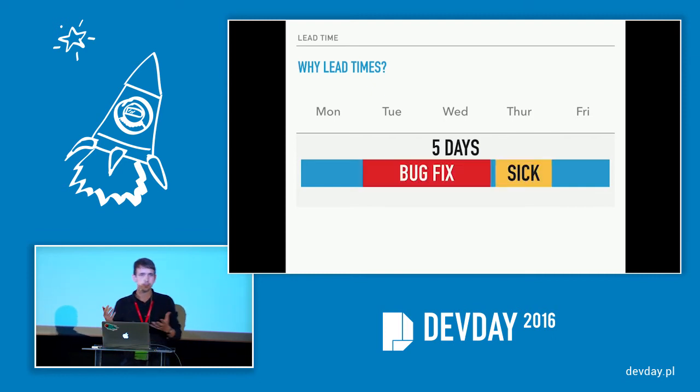It takes into account the time that Jarek had to stop work to fix a bug for 2 days. It takes into account sick days, unexpected planning meetings, all these kinds of things. And these are the things that we forget about when you're asked to estimate. But the data doesn't lie, so that's why it's useful. We just make the assumption that these things have happened in the past, and so they're going to happen at a similar rate in the future.